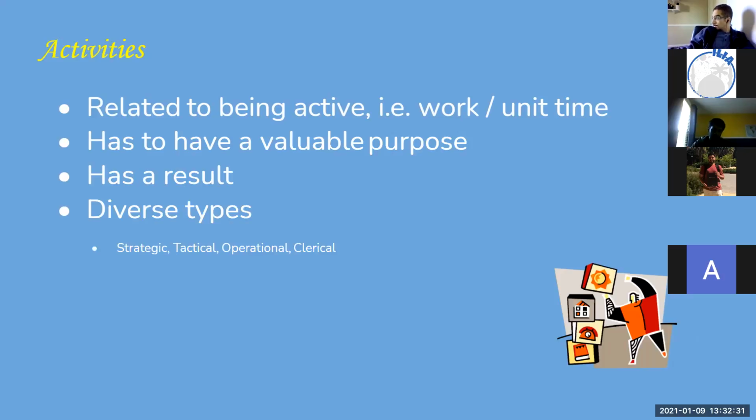So some are strategic activities, some are tactical, some are operational, some are clerical. And we'll talk about the differences of these when it comes to planning. But clerical is something that follows a very set standard set of procedures. Operational is the same thing. Only difference here, it's more diverse, more end-to-end. It includes different domains of work. Tactical is a problem, you just need to define which resources to apply to that problem. And strategic is you don't even know the problem, so you need to think a little bit strategy, higher level, cross-functional, and we'll talk more about these.